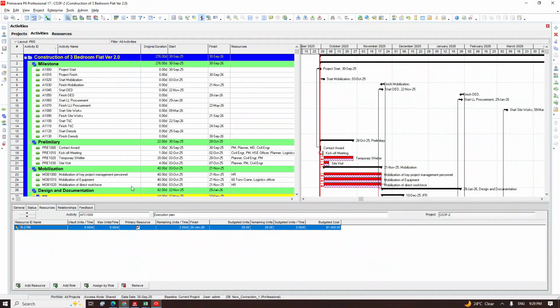So now the question remains, why are they interested in activity code in shutdown? Because shutdown is a collaborative and integrated schedule that you can have more than 20 to 30 contractors. Sometimes you will have, let's say, 16 departments, you now have additional different contractors like 6 or 7 contractors, making it about 27 or 20-something persons involved developing different schedules. So this contractor will develop their own, the unit will develop their own, you bring it together and you integrate it. So we will not start having mobilization for civil department, mobilization for electrical department, no.